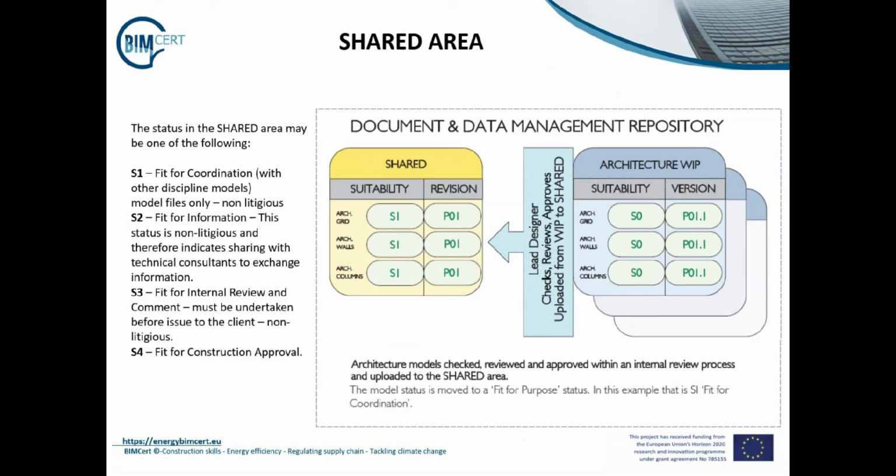Here we can see the status of the different files which are contained within the shared folder. If the status is S1, this means it's fit for coordination. S2 means fit for information. This status is non-litigious and therefore indicates sharing with technical consultants to exchange information.